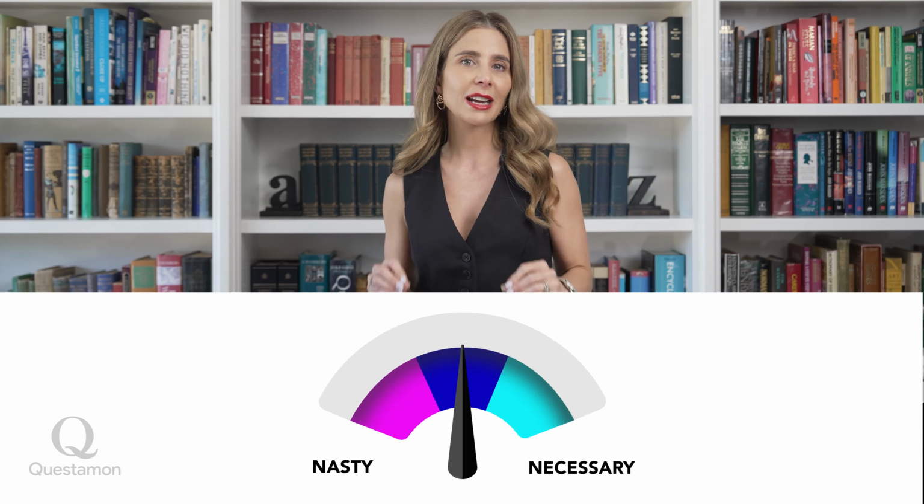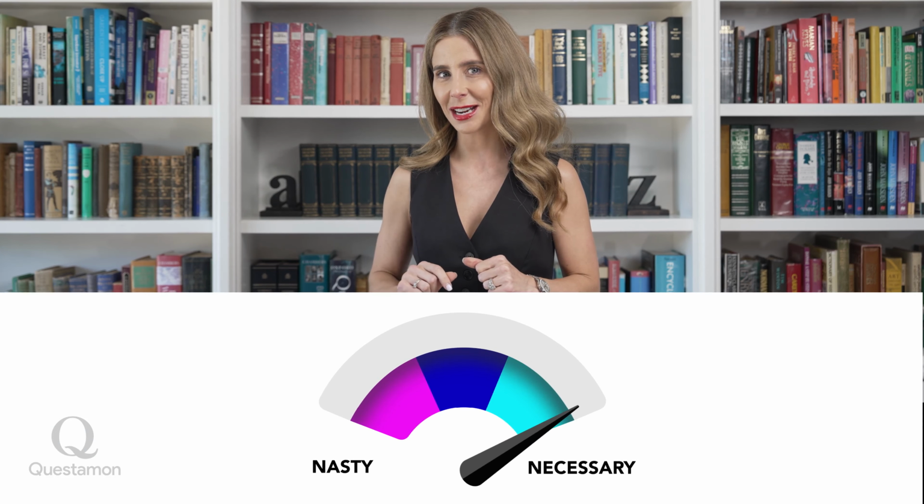Now let's consider whether liquidated damages are necessary. Now, in my opinion, absolutely. Firstly, they provide an effective mechanism to incentivize contractors to actually finish the work on time. But more importantly, they allow both parties to deal with time under the provisions of the contract rather than running off to the courts, which is time-consuming and expensive every time a project runs late, because let's face it, they are going to run late. So I'm going to rate these clauses as necessary.